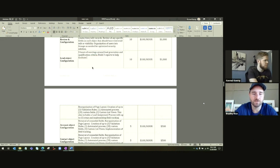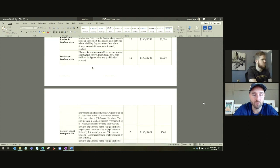Build 3 reports to help facilitate the lead generation and qualification process. Recommended reports would be, and then I would put exactly those three reports. And if they don't like it, that's okay. Then we can talk about what you want the three reports to be.